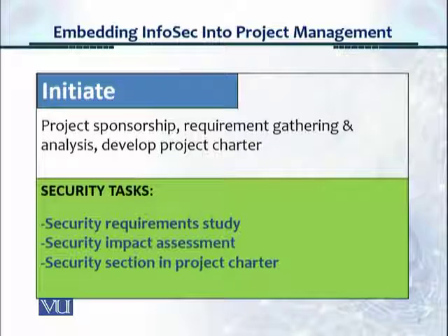And then in the project charter, it's important to put in a summary of the security requirements based on the security impacts which are relevant and practical for this project. So the outcome is really that the project charter should have a security section.